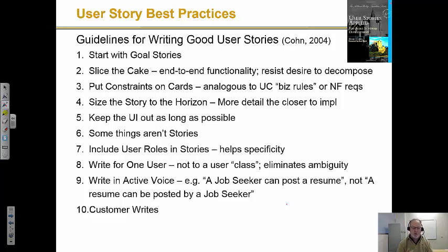So when I initially work with students, I see a lot of initial Scrum boards that say things like, I need to go create a database. Well, creating a database is not a goal unto itself, right? The goal is that a system needs some form of persistence for somebody for some benefit. So start with that goal. Creating a database is just one task out of helping achieve that goal.